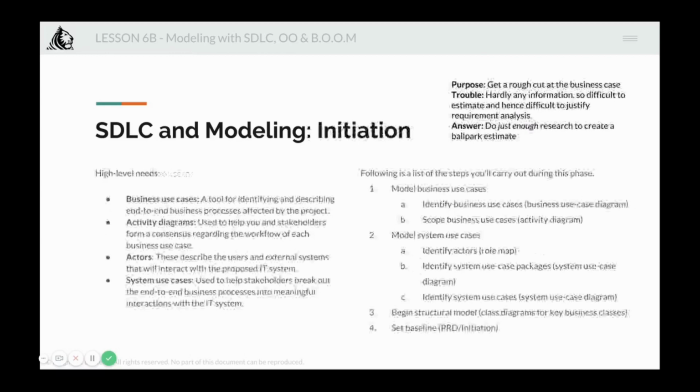the initial discussions were in certain directions, certain decisions were taken in the first meeting, where the product should be built for so and so case, and this should happen, that should happen. And then as things move along, almost a loop is formed between what was in the earlier discussion and the future discussion, because new and new requirements keep coming up, and the earlier decisions are forgotten. It's very easy for that to happen. So for anything that is larger than a month, try to baseline it, try to at least keep some sort of minutes of the meeting, minutes of the key decisions, in one single place so that you can refer back.